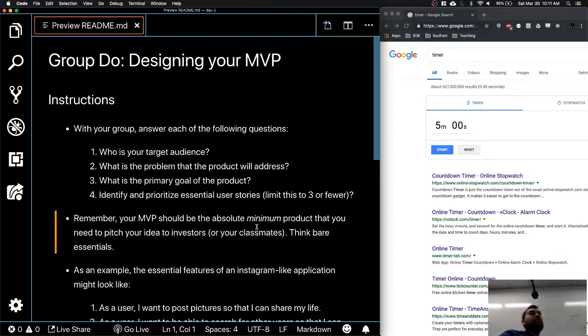Okay. And then we try to explain, okay, what is MVP? What is the absolute thing that you need, right? When you ask the business, they're like, well, I want to post a picture also. I want the captions also. I want the heart also. I want a few more things. Everything is MVP for me, right? So that's where the trouble begins, right? It's kind of hard to train people to understand, well, I'm paying the money, right? Give me this also, this also, this also. So you have to try to explain to people, okay, what I'm saying is that within this time frame, what is the minimum requirement, without which nothing is going to work. Okay.